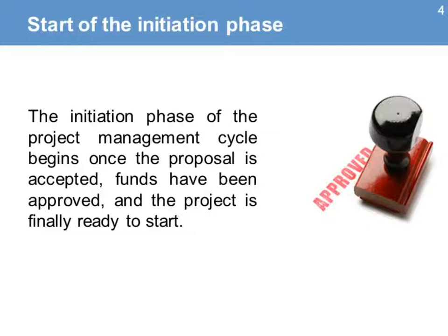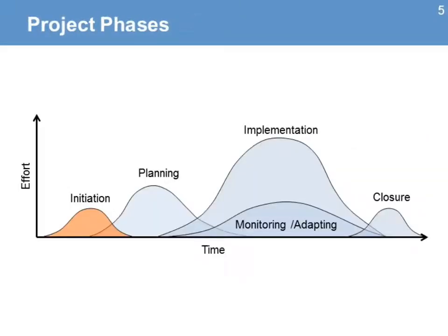This is the moment a project manager will be assigned with the responsibilities to lead the project. This phase requires a good level of effort, as much as the closing phase. Note that there is an overlap with the planning phase. This overlap means that the planning phase can start with the development of the management plans without having to wait for the completion of all activities in the initiation phase. This phase requires some good effort and some time to be properly completed.